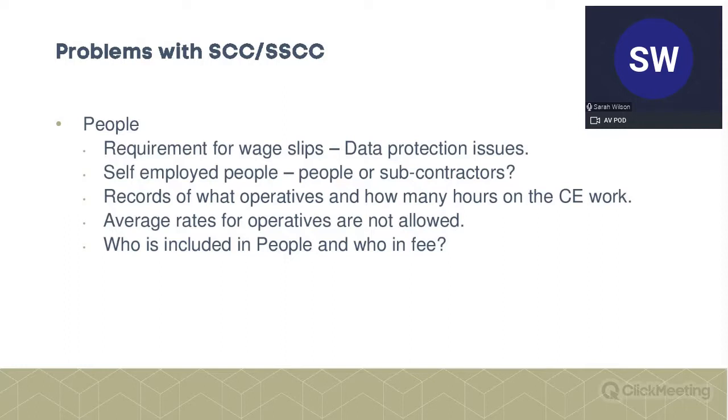Right, just a few problems, or as one of my clients used to say, challenges, with the way in which NEC deals with this, as opposed to JCT. So, the people issue: you will have seen it's really prescriptive. And what we often see is the project manager wanting to see how you've calculated the cost of people. And it's not just, we pay our labourers X pounds per hour, and then you add on all the extras. So it's X plus Y equals Z pounds per hour.